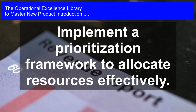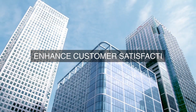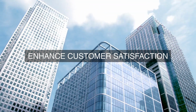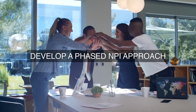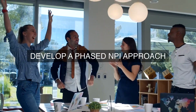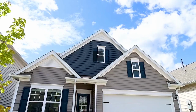The organization must also implement a resource allocation system that ensures the effective utilization of resources across multiple projects. This includes resource leveling, which involves identifying and alleviating resource bottlenecks, and resource smoothing, which involves distributing resources evenly across projects. The resource allocation system must also take into account the skills, expertise, and availability of team members to ensure that the right people are assigned to the right projects.